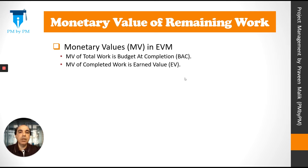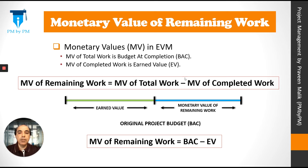Now that we have understood the remaining work, let's understand the monetary value of remaining work. In EVM terminology, there are two important monetary values: the monetary value of the total work is Budget at Completion, or BAC; and the monetary value of the completed work is Earned Value, or EV. So the monetary value of the remaining work equals BAC minus EV.